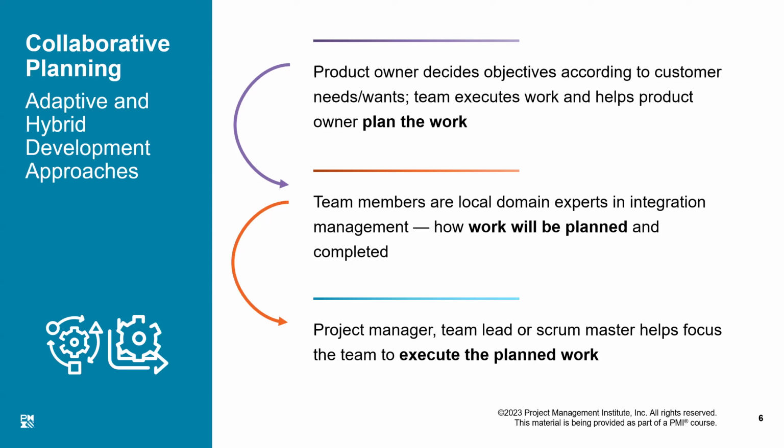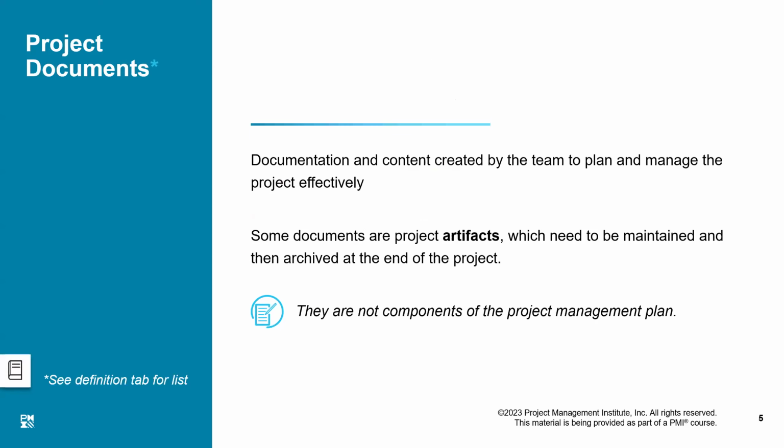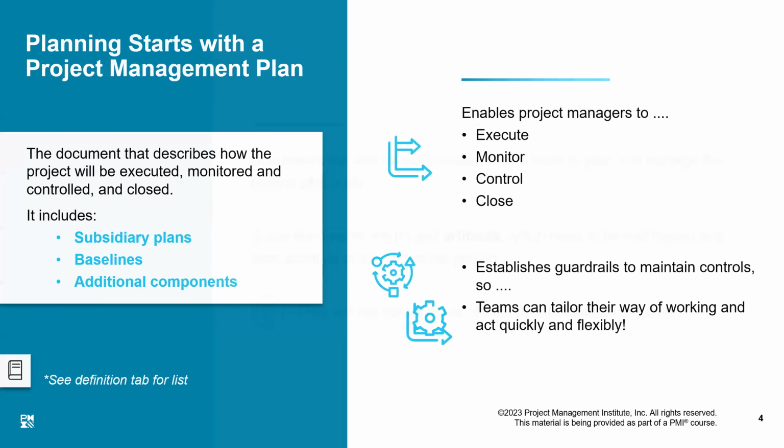They are part of the project management plan. Just look here. They are called the baselines, right? There are three project objectives: scope, time, and cost. Each one of them, when finalized, means everything in the project has been encapsulated, and these three things are the three baselines. If I have these three baselines established, I can get into the execution of the project. My planning is complete, right?